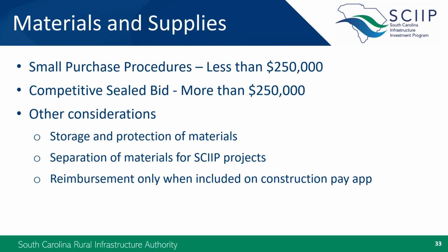If you do buy materials in advance, you'll have to wait until construction is underway and the materials are listed on the contractor's pay app to request reimbursement for those purchases.